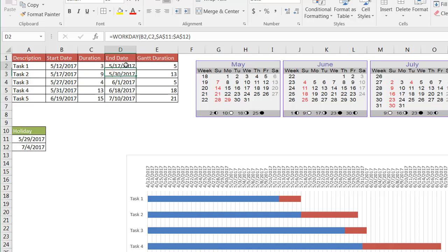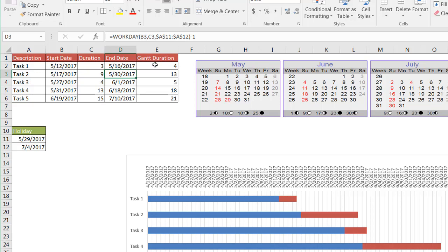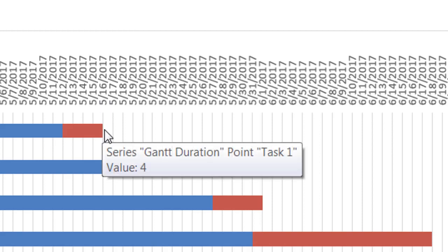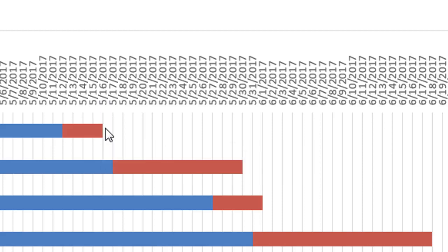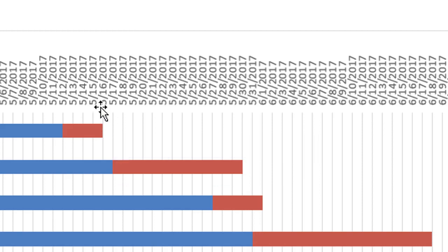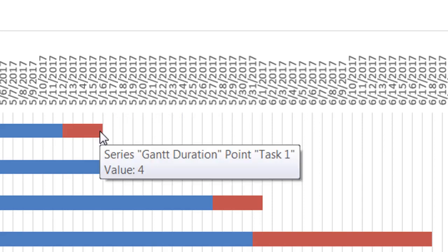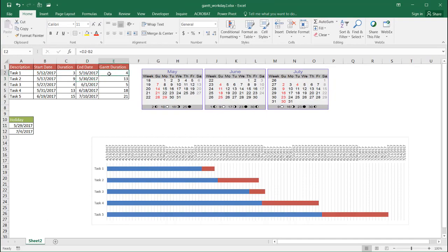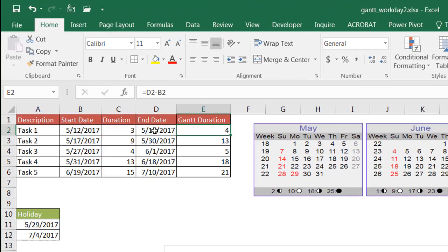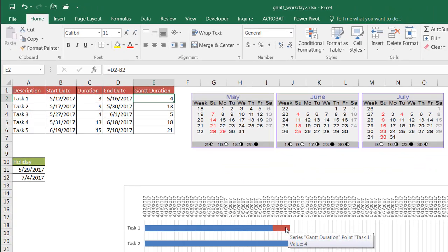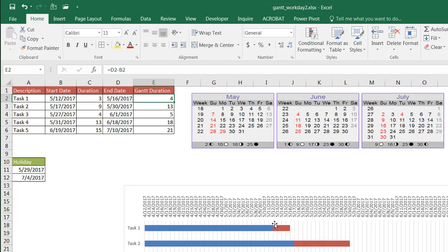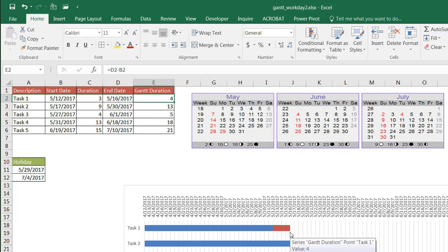Because what happens when you draw it out, and I'll explain this Gantt duration column, when we draw it out with there, it's going to end it on the 17th, which really doesn't fit the particular bar chart. We need it to end on the 16th, visually depicting it ending on the 16th. That's why we have our minus one. So if I do minus one here, the Gantt duration is going to correctly identify that as four days, so it ends on the 16th. Because people might see it as touching the 17th and including the 17th. So we're going to have it touch 5/16, and it more visually represents taking up the 16th and not going to the 17th.